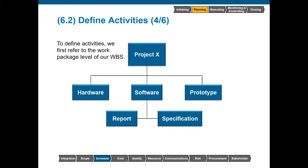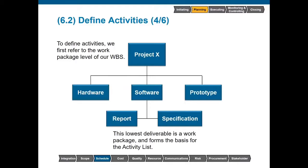For further decomposition, we are going to take our WBS and look for our work packages. In this case, we have Project X as our deliverable at the top, with three categories: hardware, software, and prototype. Within software, we have reports and specifications. With a report, we would say we probably can't decompose it further because we don't want to break it up into individual paragraphs or lines — so we are at the lowest level, the work package, and this will be the starting point for our activities list.